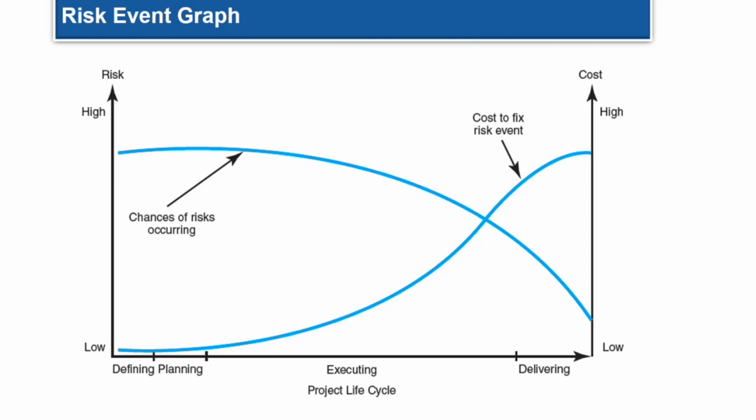The later the stage, the cost will be higher. Even though the risk factors fluctuate, the cost of correcting and managing risk increases all the way. Okay, so there are some examples. I'm just introducing. For example, the cost of mismanaged risk control early on in projects is magnified by the ill-fated NASA project, the NASA Mars Climate Orbiter. Okay, that's the ill-fated 1990s project.